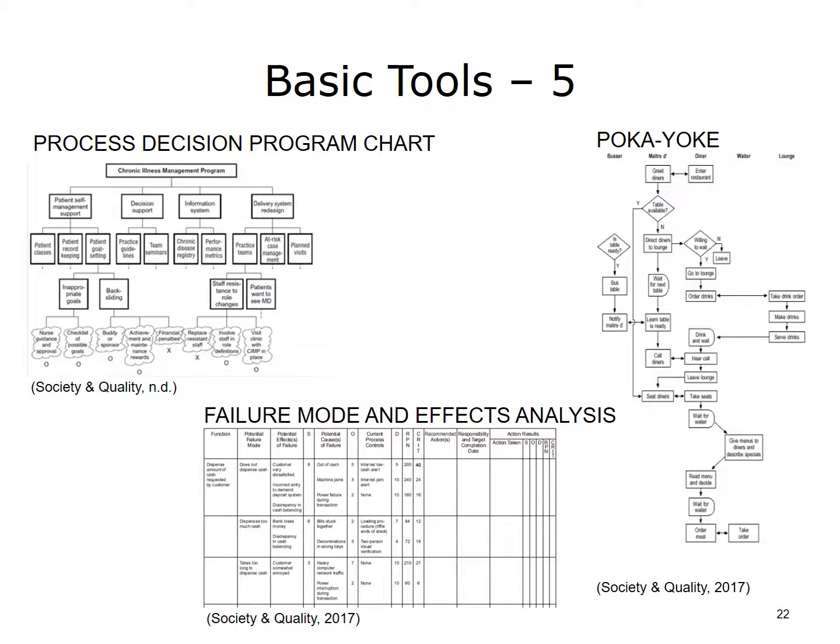Process Decision Program Chart. The Process Decision Program Chart is a type of contingency plan that guides the efforts of a team when things do not turn out as expected. The actions to be completed are listed. Then possible scenarios about problems that could occur are developed. Management decides in advance which measures will be taken to solve those problems should they occur. This chart can be helpful when a procedure is new and little or no experience is available to predict what might go wrong. TOG, 2004.